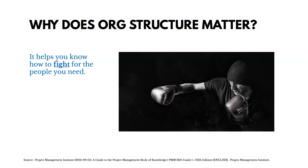Getting back to the original question — why does the structure matter? Probably the most important reason is it helps you know how to fight for the people and resources you need. It's easy to do that in a project-oriented environment, but in a functional organization it can be more difficult to secure resources with functional managers. You're almost borrowing their people and their time. A functional manager may have different priorities and pull your resources off your project, making it much more difficult to fight for what you need.